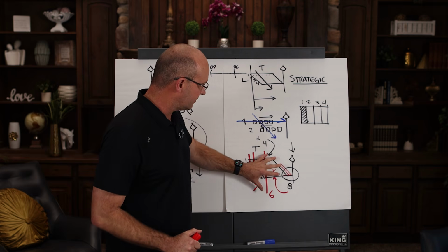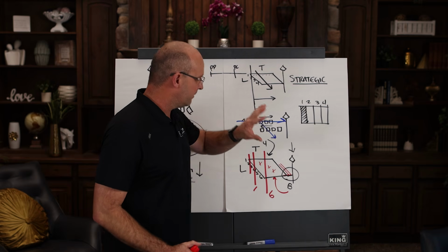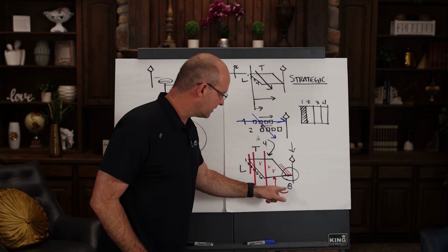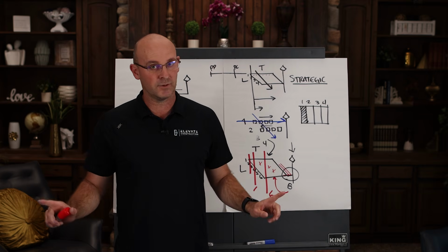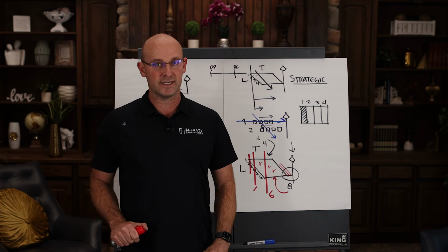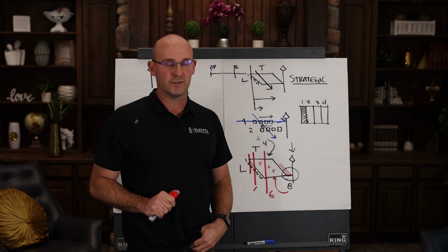But we have to get to, for construction, a production plan with buffers. And if you don't have buffers, you do not have a plan that will win. It will be past, you will delay beyond your schedule.